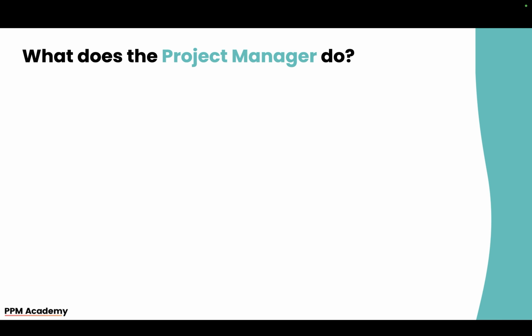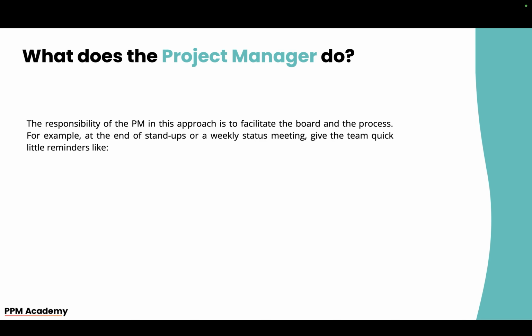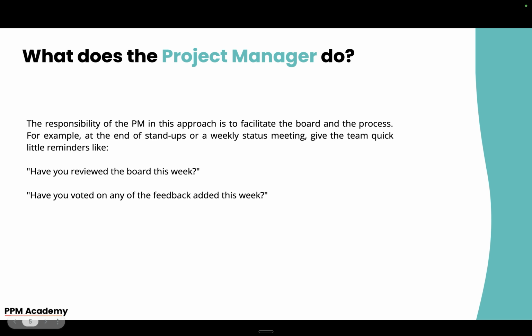What does the project manager do with all this? The responsibility of the PM in this approach is to facilitate the board and the process. Like you would with any other project management process, you are often the facilitator, ensuring things are happening, giving people the right environments and the tools they need. As an example I've put in here, at the end of stand-ups or weekly status meetings, give the team quick reminders like: have you reviewed the board this week? Have you voted on any of the feedback added this week? And we need an owner for X action, any volunteers?